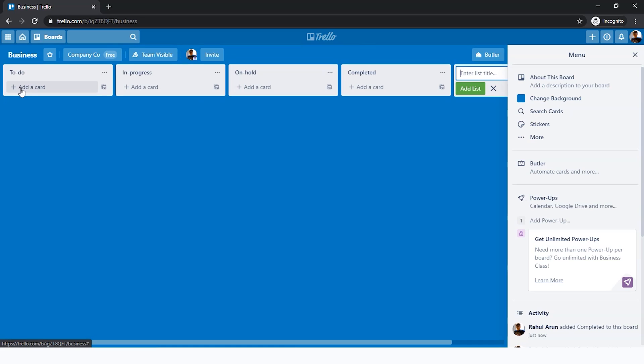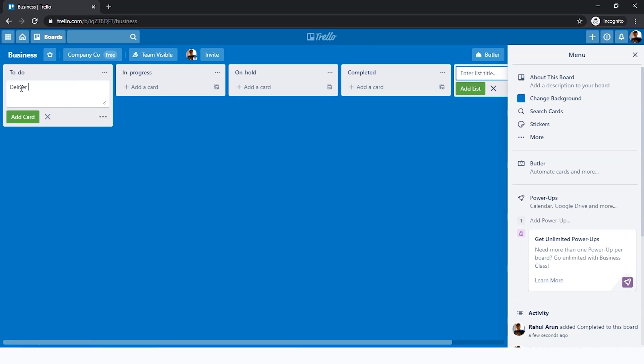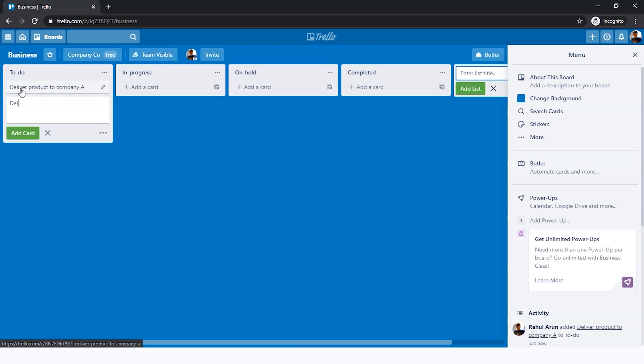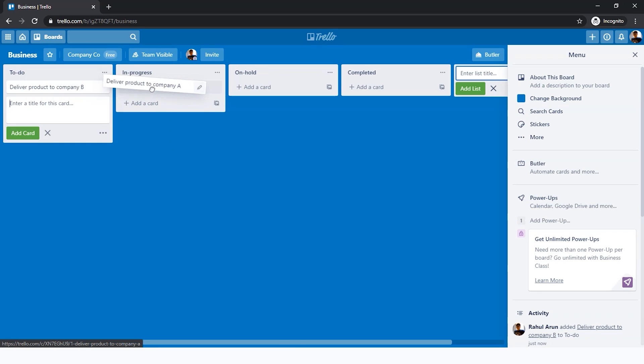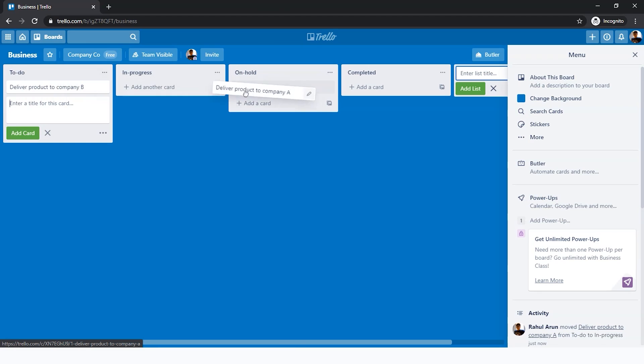In these lists, there are things called cards, which are like subtopics. First of all, let's add a very simple title. For example, 'Deliver Product to Company A,' second, 'Deliver Product to Company B,' like this and so on and so forth. Here, this is a card. This card can be moved from each stage to another as it progresses.